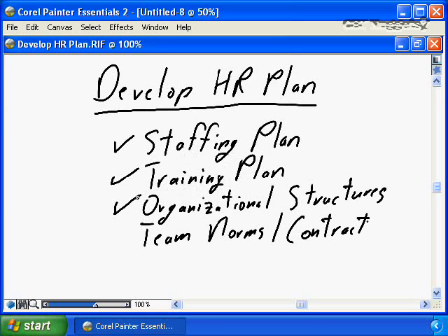You need to develop efficient organization structures. You need to ensure that you have a project organization in place that recognizes span of control to make sure that the teams report to leaders who have the knowledge, the skills, and the authority to manage the team, that the teams have appropriate scope of control, that the teams work on a consolidated focused area, that the team leader has the appropriate number of resources reporting to them. Again, a norm being no more than 7 to 8 resources reporting to a leader, that you have an effective organization structure in place for your project, that the teams can work effectively, and to ensure that the team works effectively, you need to develop team norms.